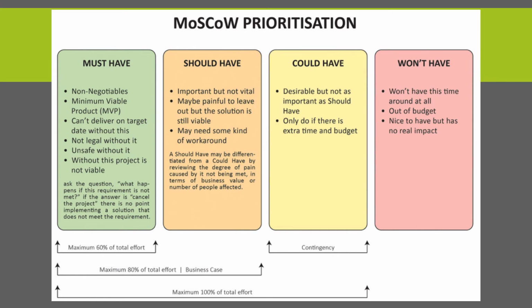right? One important aspect in this product backlog is MoSCoW prioritization. You can use multiple ways of prioritizing. MoSCoW is one of the widely used prioritization techniques for a product backlog, for tuning it, ordering it, ranking it. You can use the Kano model. You can use a combination of business value, MoSCoW, plus you can use risk and technical complexity. You can use multiple things.